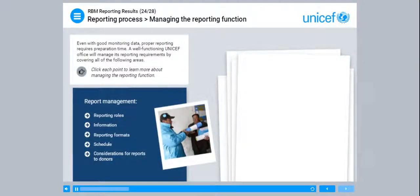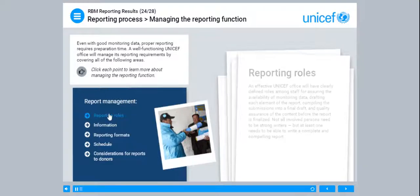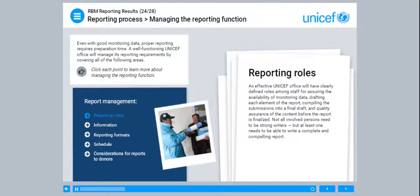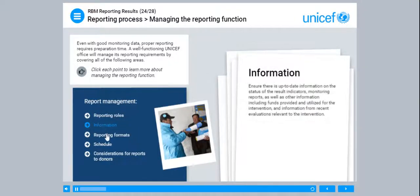Even with good monitoring data, proper reporting requires preparation time. A well-functioning UNICEF office will manage its reporting requirements by covering all of the following areas. An effective UNICEF office will have clearly defined roles among staff for assuring the availability of monitoring data, drafting each element of the report, compiling the submissions into a final draft, and quality assurance of the content before the report is finalised. Not all involved persons need to be strong writers, but at least one needs to be able to write a complete and compelling report. Ensure there is up-to-date information on the status of the results indicators, monitoring reports, as well as information including funds provided and utilised for the intervention, and information from recent evaluations relevant to the intervention.